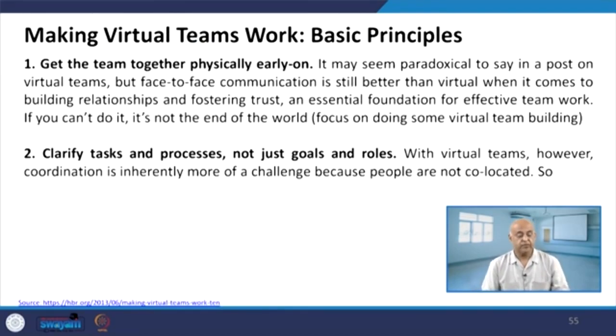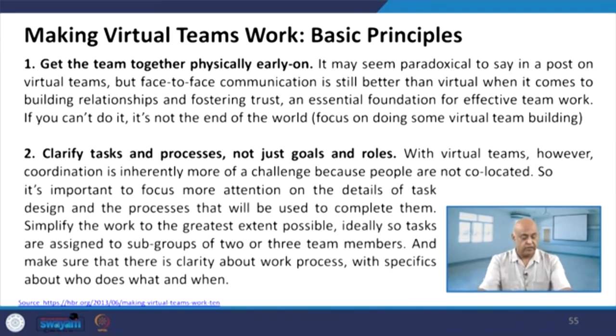Finally, we come to the basic principles for making virtual teams work. Get the team together physically early on, which helps build the relationship and foster trust. Clarify the task and processes, not just goals and roles. With virtual teams, coordination is inherently more of a challenge because people are not co-located at the same place. So it is important to focus more attention on the details of task design and the processes used to complete it.